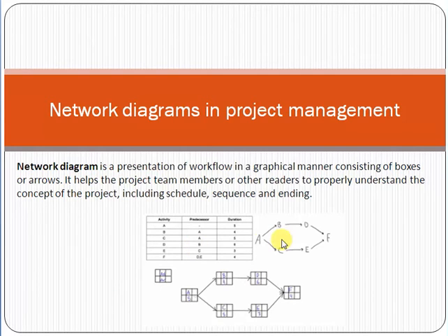See friend, here, just taken as an example, network diagramming: we have seen A, B, D, F and A, C, E. So this is a very simple example of a network diagram here, friend. You can see that we can go from A to B, B to D and E, and F. F is the ending point. Similarly, another path is possible, like A, C, E, F as well.